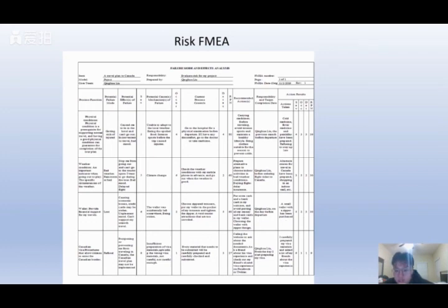The wallet loss. I think the loss of my wallet will have an impact on my itinerary, which will deprive me of financial support during the travel. I don't think it happens very often, but it's hard to prevent. So the severity here is 6, the occurrence is 2, the detection is 5, and the RPN is 16, the same as the bad weather. The action I think should be taken is to put some cash and a bank card in my suitcase and avoid putting all my money and bank cards in the wallet, choosing a wallet with a zipper design.